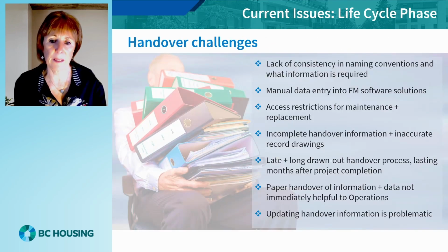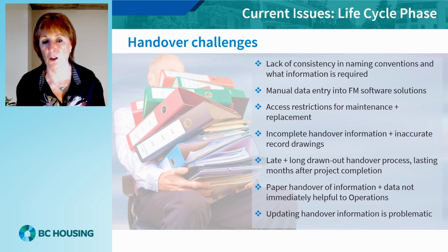The current paper-based process results in several significant problems for the facilities team. Typically, handover information is provided months and months after the team has had to start operating the facility. They have had little to no opportunity to develop preventative maintenance plans ahead of handover. The record drawings do not reflect accurately what has in fact been constructed.